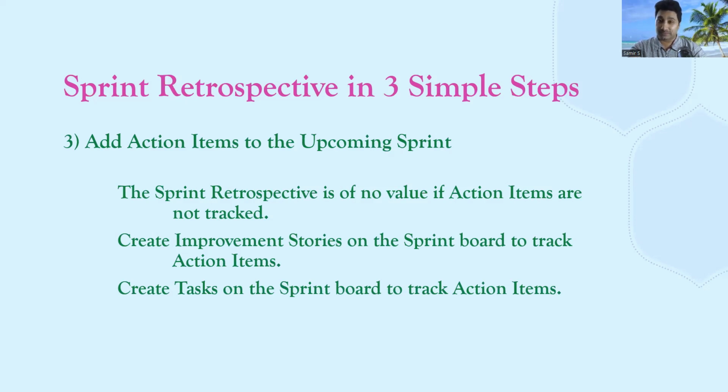Many of the Scrum masters or whoever is conducting the sprint retrospective miss to do this, because once they capture the action item, they forget about it. As a result, the team loses interest in the retrospective. So here, add the action item to the upcoming sprint board.